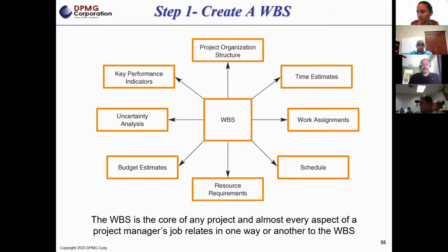So when we look at the work breakdown structure, it definitely drives all these other areas. The work breakdown structure drives how your project should be structured, who should be on your team, right? Depending on the work that needs to be performed, that should be driving who is on your team. It also drives how you should be breaking down your time estimates for the activities being performed. It's also going to drive the work assignments: who's performing what work? It's also going to drive the creation of the schedule, as you're going to see. The work breakdown structure should be driving how you create the schedule, not the other way around.